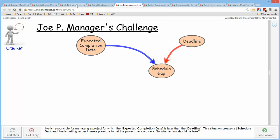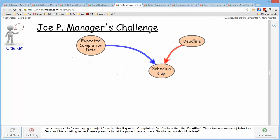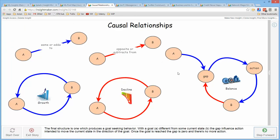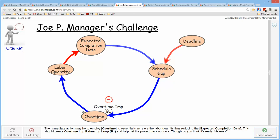The way we developed this relationship map, we started with a deadline and expected completion date, which produced a schedule gap. That gap encourages working overtime, which improved the labor quantity, which reduced the expected completion date and therefore reduced the schedule gap. Using the notation developed in the causal relationships lecture, we begin the same way: expected completion date, which we assume is longer than the deadline, creates a schedule gap that influences overtime, which influences labor quantity, and the increased labor quantity reduces the expected completion date, thereby reducing the schedule gap.